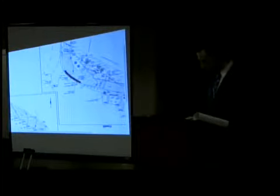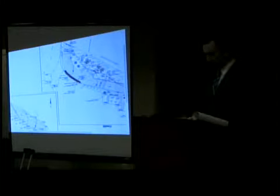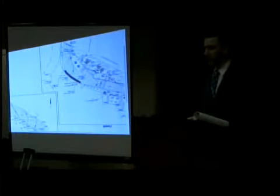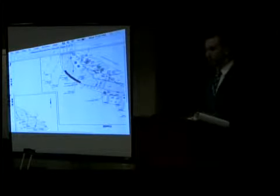And then the phasing plan was the last piece that was submitted as well. The townhomes, in addition to the commission's concerns, are concerned about phasing as well, because part of this project is to add parking, for the very reason that there's not a lot of auxiliary parking with the development. So if the contractor were to rip up every driveway all at once, they would be in a tough spot for parking as well.